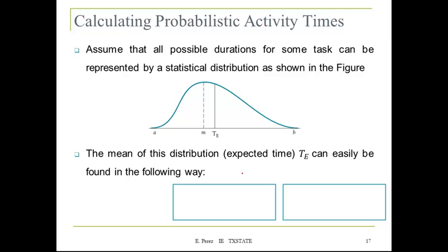So if you have, for instance, a data set for the machine failure rate or the machine duration for completing certain products, you can use that information and create a statistical distribution for those time durations, and then use that information to model the duration of the task.